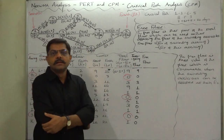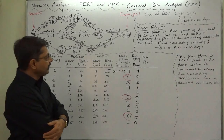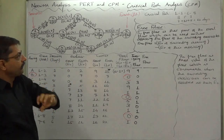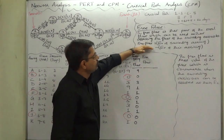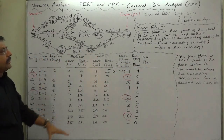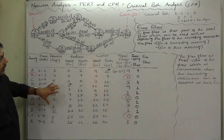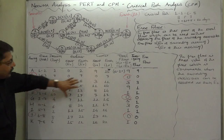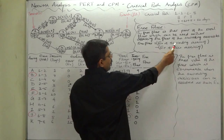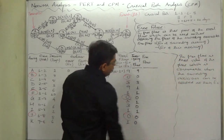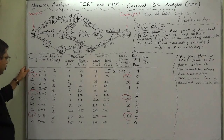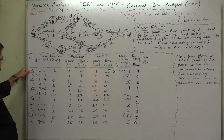The formula — please, instead of only trying to remember the formula, do try to understand how the free float is calculated from this chart. The formula can be written as: earliest start time of the succeeding activity minus earliest finish time of the current activity.